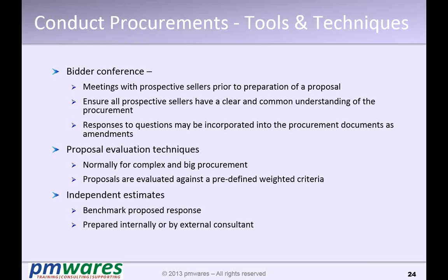A pre-bid meeting, right? The buyer calls all the sellers to a meeting and asks them that whatever questions or clarifications you want to ask, you can ask. So all the questions are answered there. A transcript is created with all the questions and answers and given to all the people, so that everybody has all the questions which are answered.